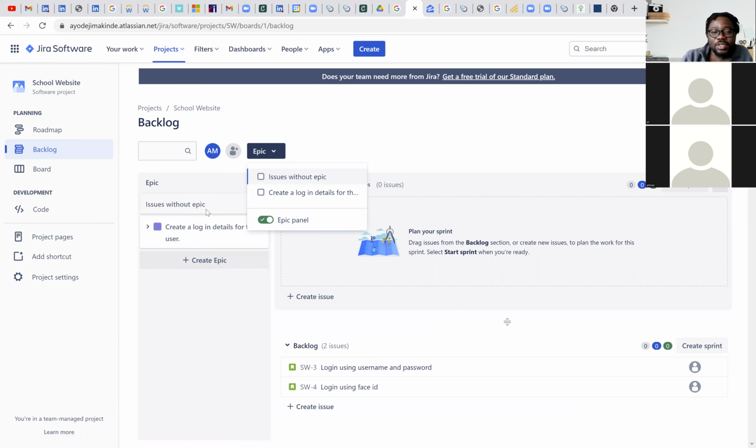Here you see Epics. If you want to create more Epics, you can come here, or you can come here. If you want to create more stories, you can come here. Now, if you look at these stories and these epics, they are not linked. But the ideal thing is that each story is linked to an epic, because in real life you're going to have multiple epics. So how do you know what stories in your backlog are linked to a certain epic? The only way is linking them, so that once you see the story, you know this story is for this epic.